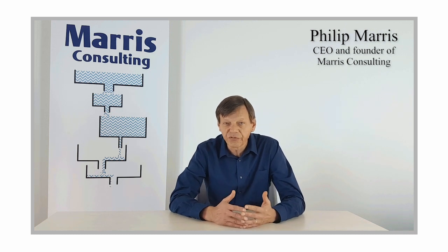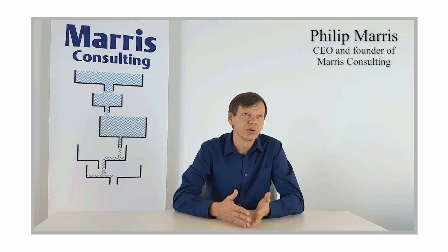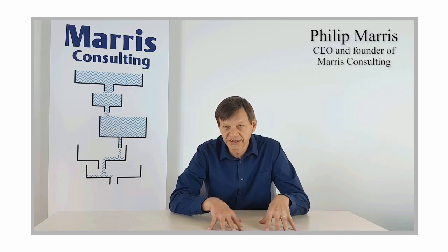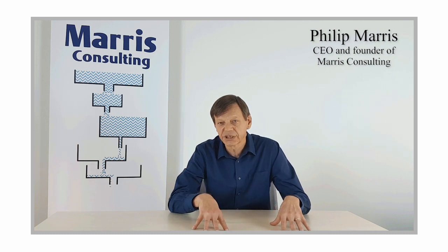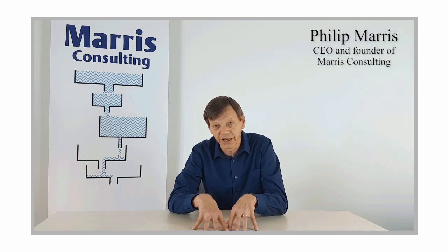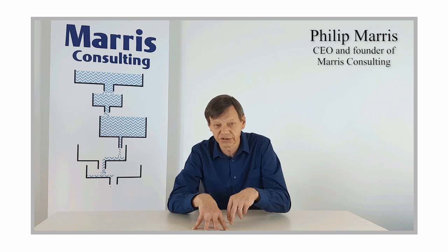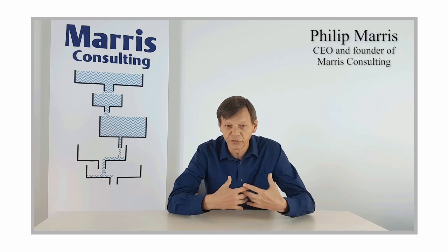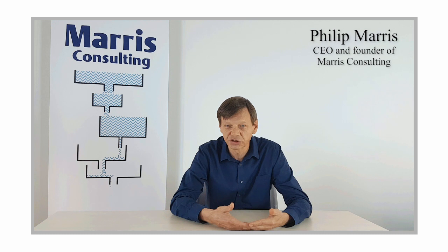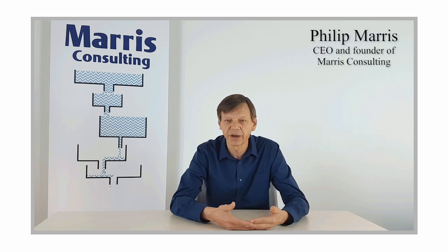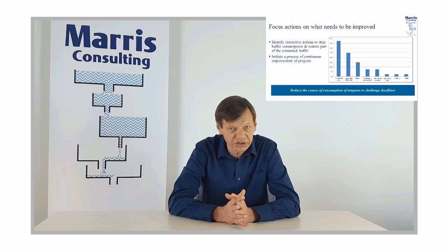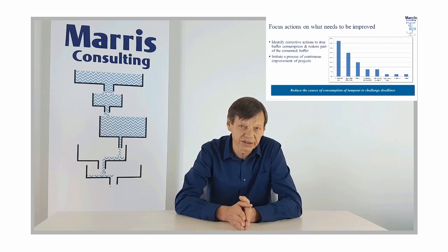And so what we've found is normally you can probably break down into about 5, maybe 8 different families, the types of projects that you do. You build these templates and you maintain them. And of course, having that will ensure that normally you don't forget tasks, or if you've forgotten a task once, you go back to the template and add it in, okay? And it will also be very good for continuous improvement, because you will have a standard template on which to improve, and you will little by little think about it and how to improve it, okay? So that's how you would have dealt with the first problem, unidentified tasks.